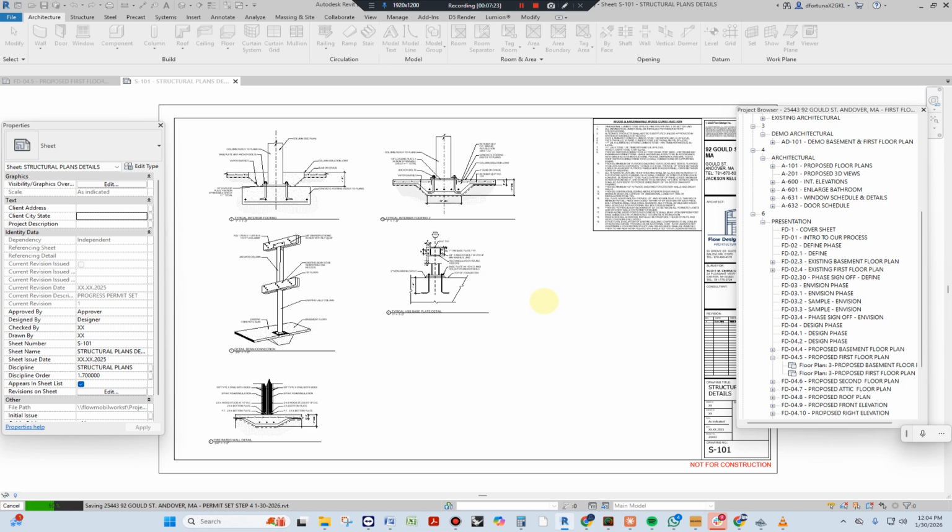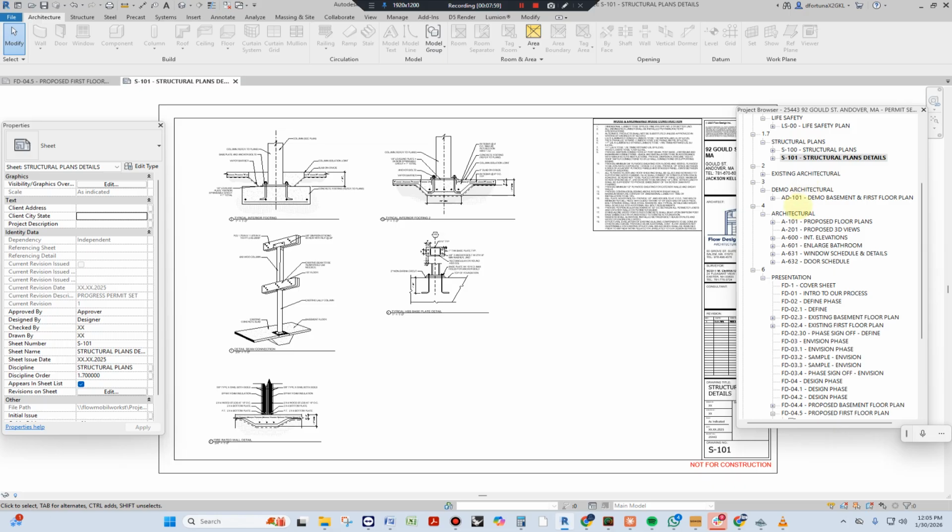You clean up. What I did, the steps I did of cleaning up the drawings, you would do that moving forward. So you save the approved designs as they are, and then you start cleaning on the new, save as a new model. Why? Because I like to have a record of everything before permit set. What if the scope changes and you deleted sheets that you're gonna need later? Like, oh wow, the client actually wants to do a dormer now and they want to add a garage, and you deleted the sheets. It would become very complicated to have to bring them back. So you don't want to do that, okay?